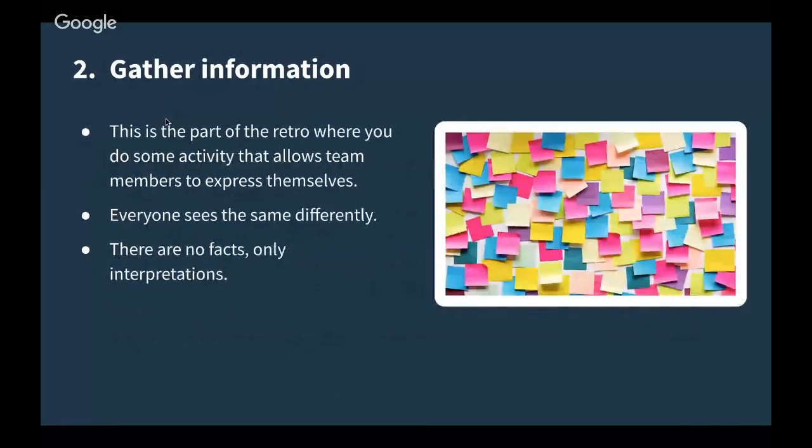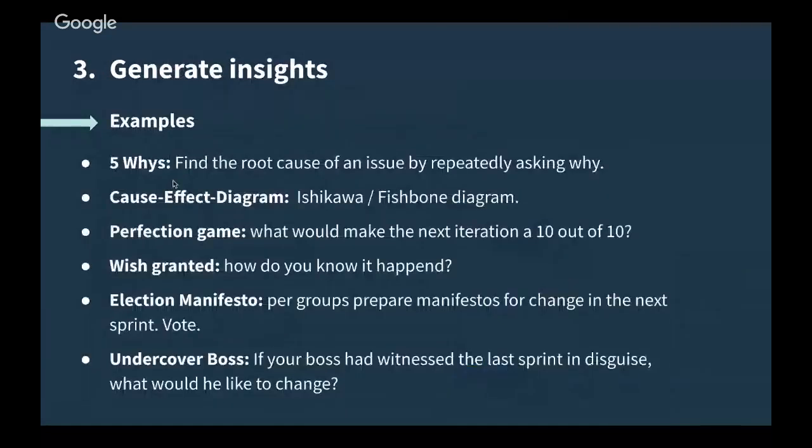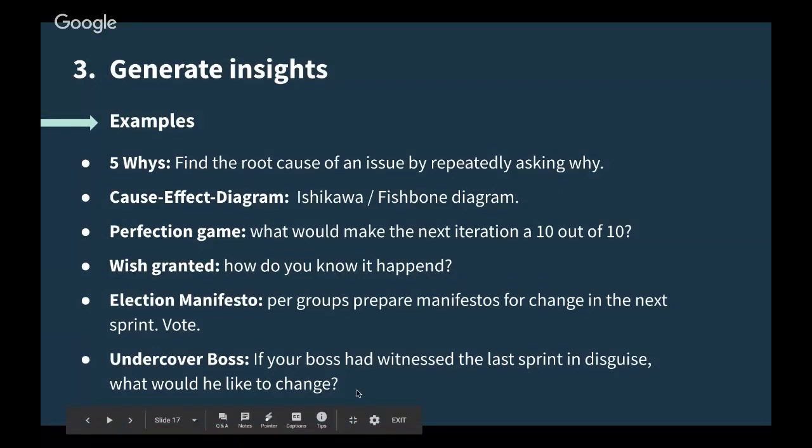But here you discover that there is like a huge problem you need to discuss. So maybe you should be prepared to use some of these exercises. And for that, what I do is I review the previous sprint, I review the Jira board, and I take a look at the previous week comments on Slack to see if we are going to have like an issue to discuss, and be prepared for that.